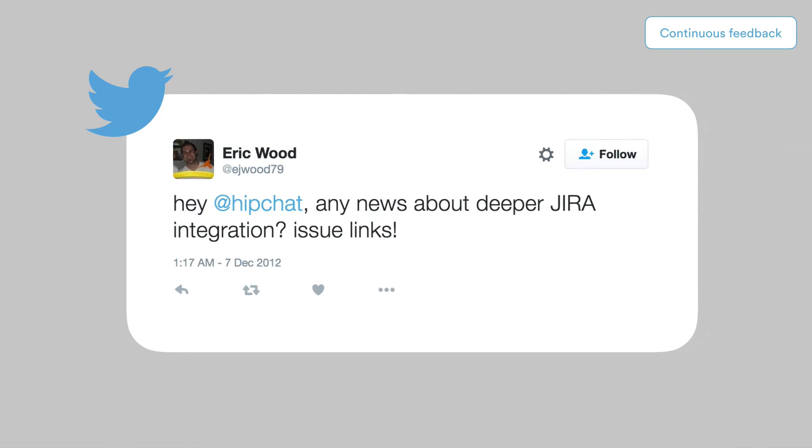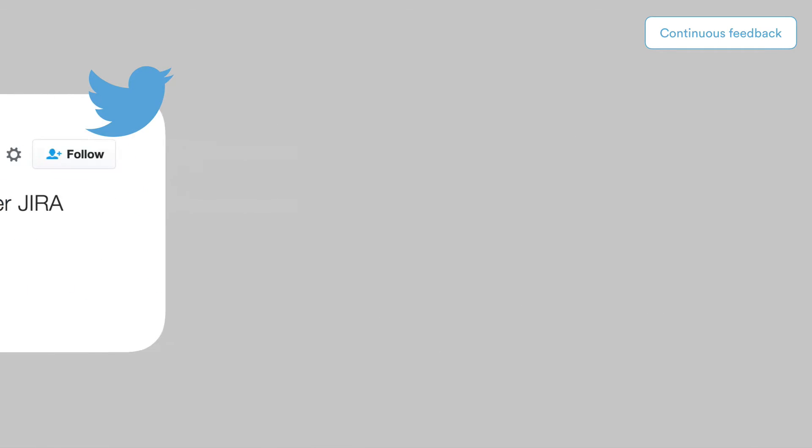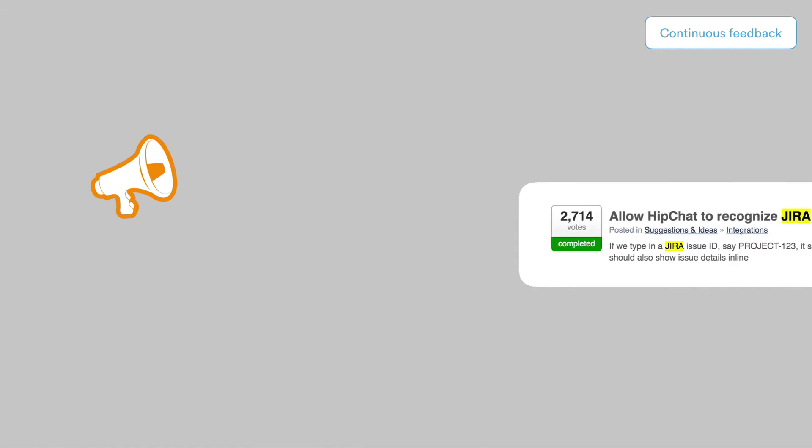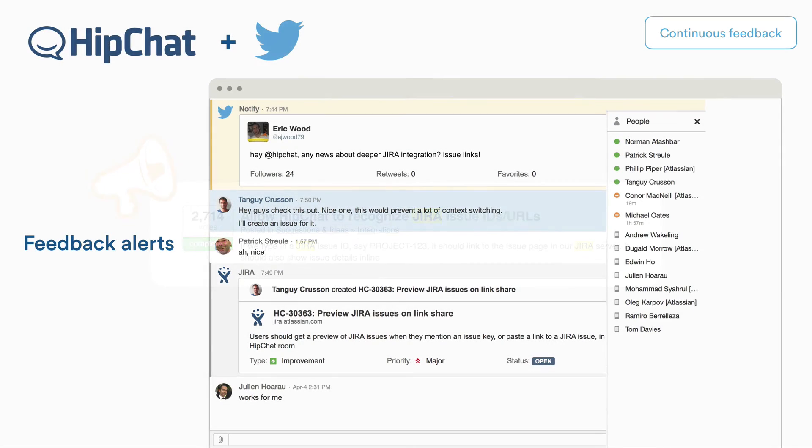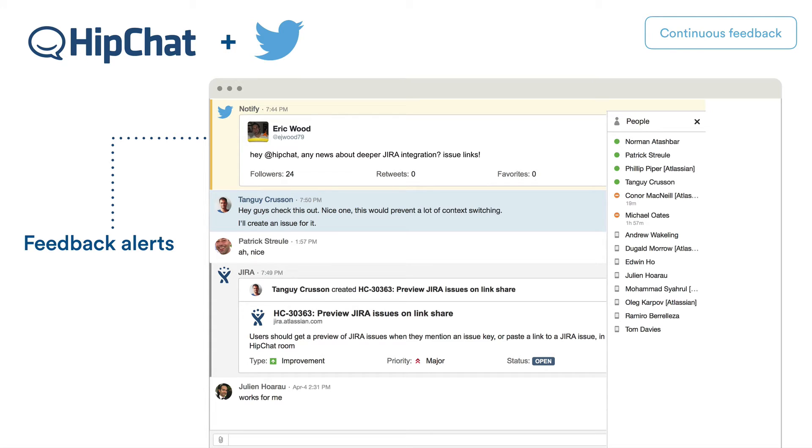So for example, today when you paste a link to a Jira issue in HipChat, HipChat gives you a bit more information about the issue right in chat, to avoid context switching too much. This feature was requested from a couple of sources. First from Twitter, which is a great way for your teams to receive feedback about how users use your software. And also from UserVoice. This was a ticket which received quite a lot of votes. So the way this looks for us is we'll receive these tickets inside HipChat rooms. Then usually we discuss them. And it usually ends up with the creation of a Jira issue, which then sits on the backlog. So the whole team can discover user requests as they come in and help shape the backlog.